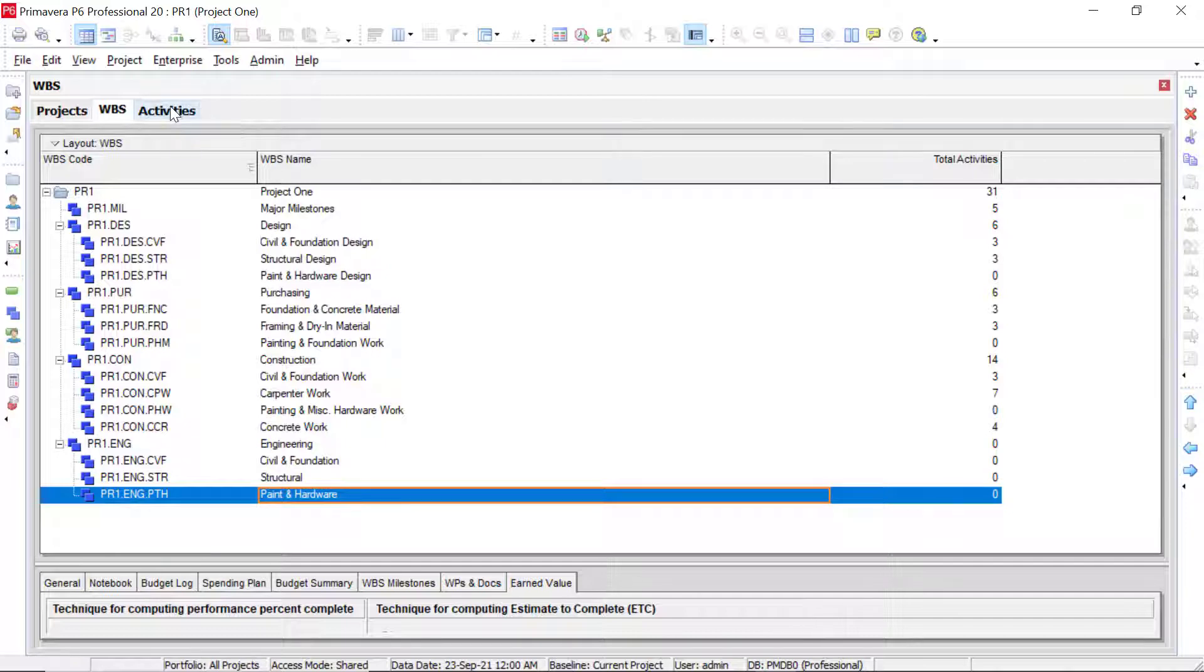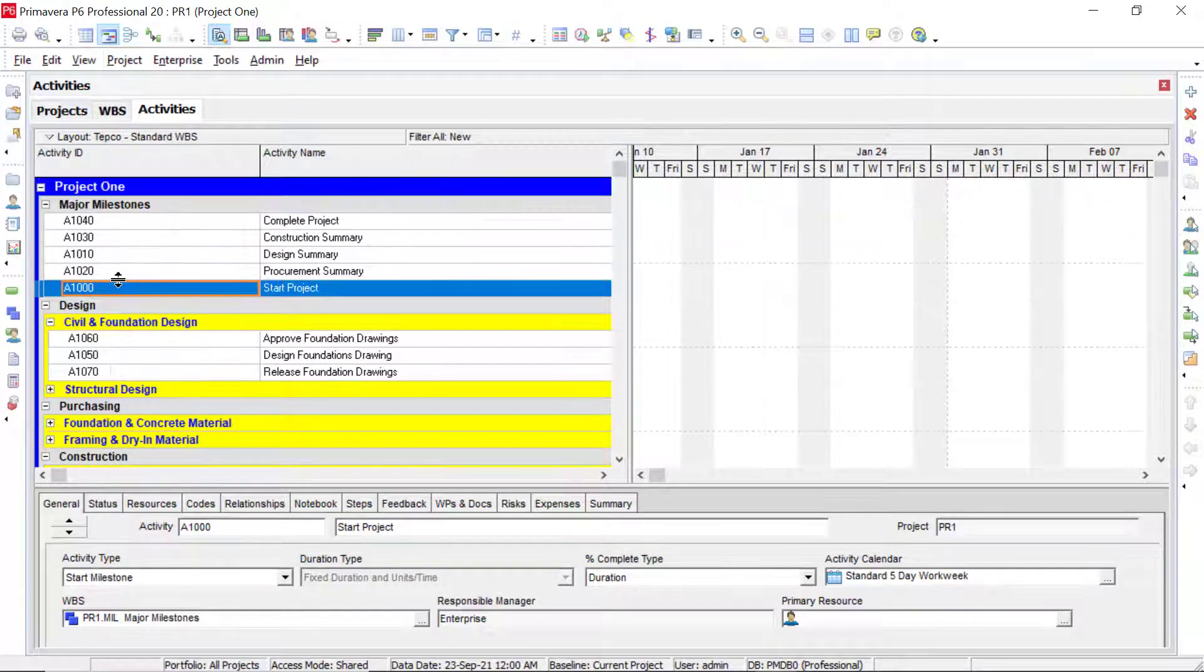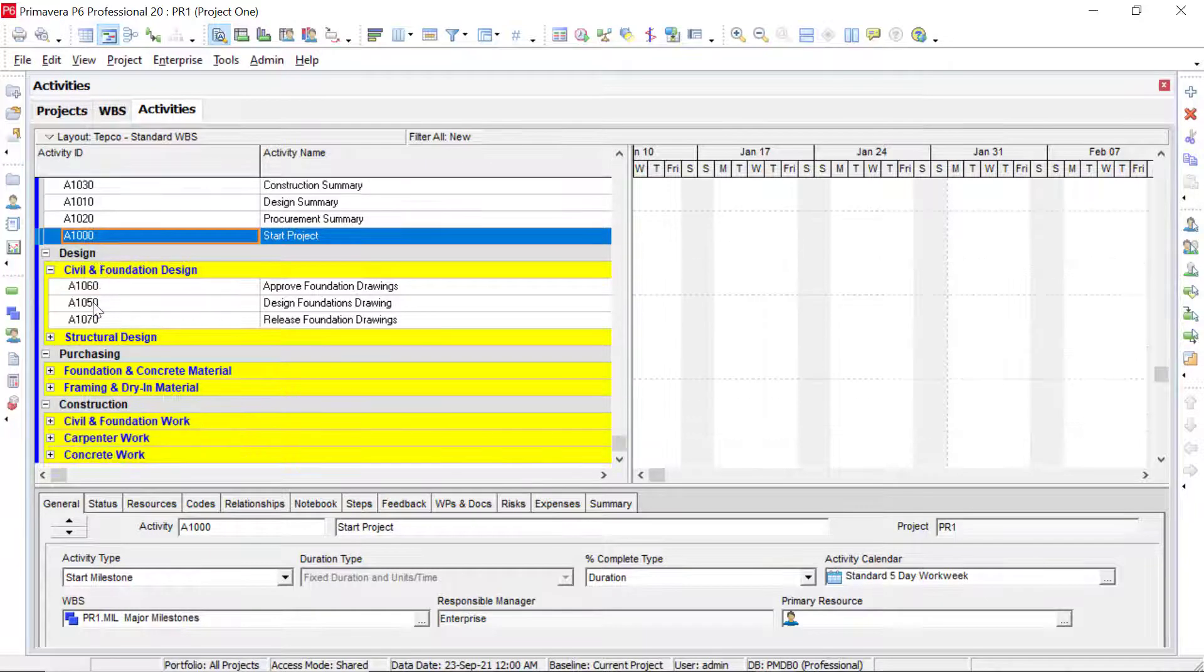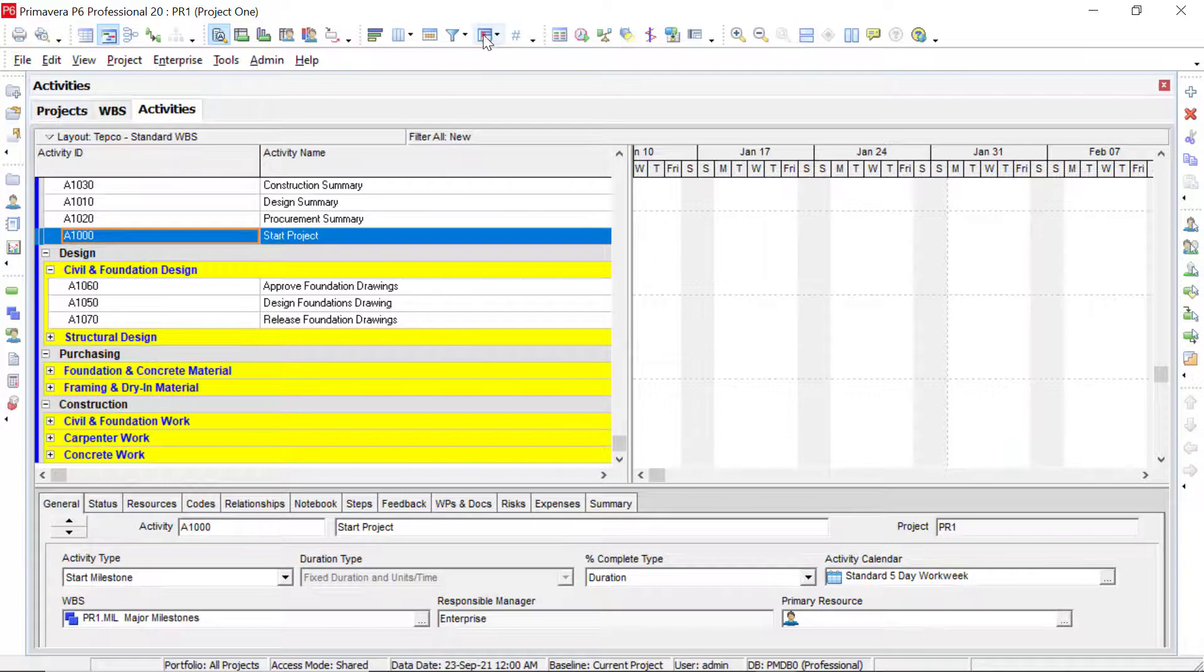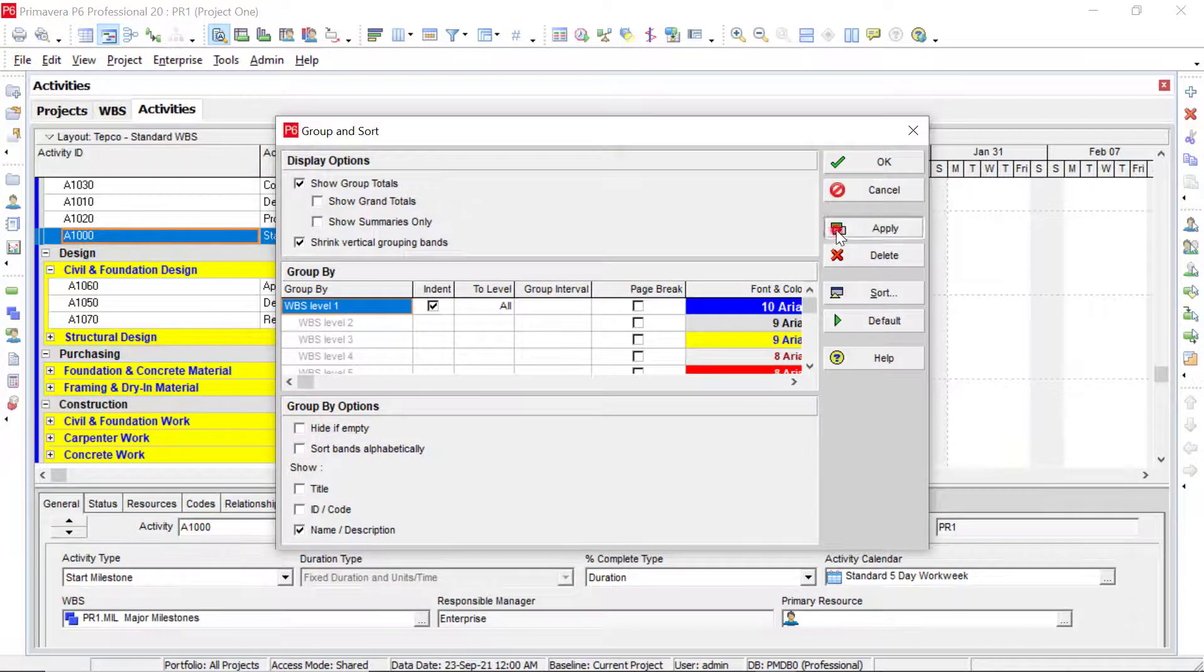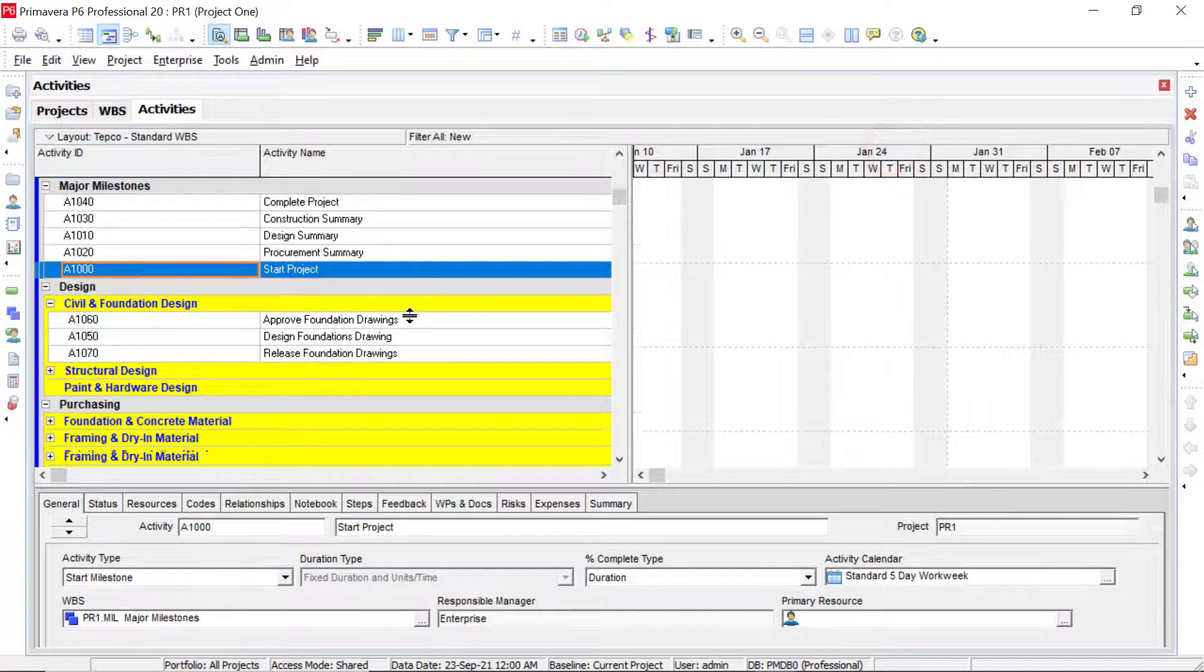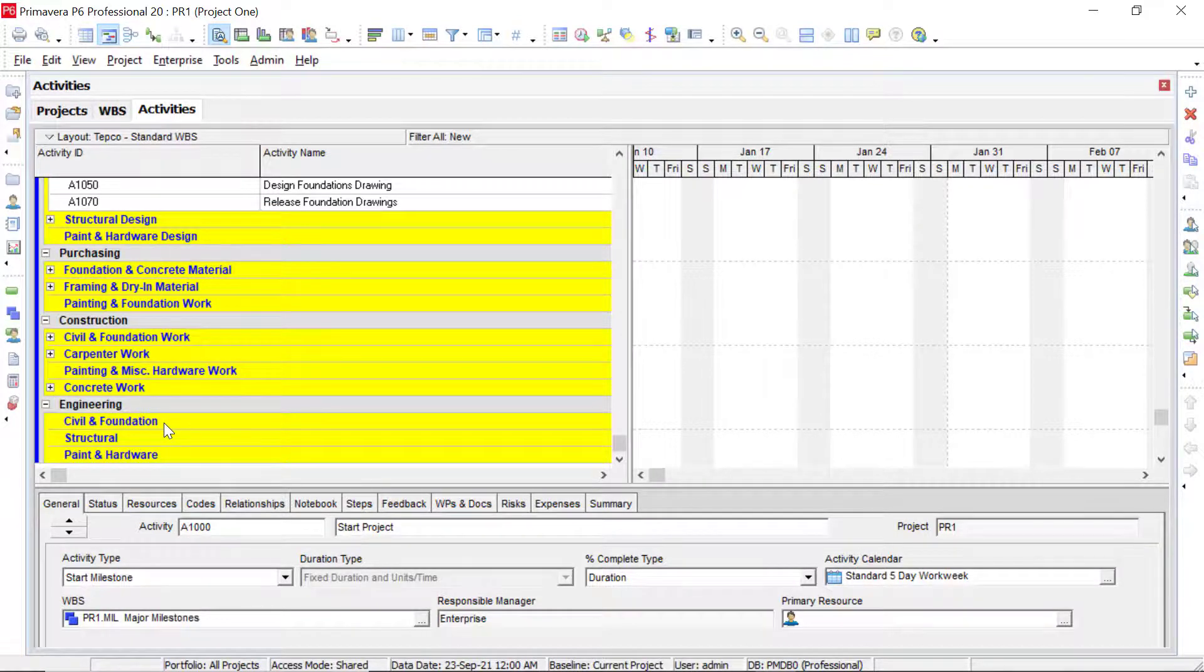So if we go into our activities view to look at it, let's see. Notice we only see those three that we had to begin with, the design, purchasing, construction. In this case, what most likely happened is that in our group and sort, we have the hide if empty checked. So let's go look at that. So this box right here, if it's selected, it will hide any element that we have there that doesn't have any activities added underneath it. So if we uncheck that box and click apply and then OK.